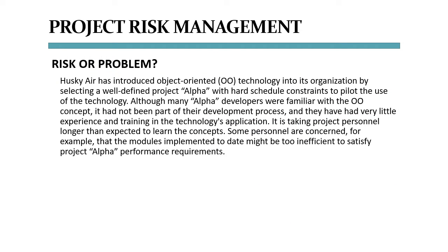There's a difference between a risk and a problem. The major component of a risk is its likelihood or probability. To become a risk, a situation can't have more than a 90 to 95% probability of happening. If a situation has more than a 90 to 95% probability of happening, it is a problem, and we need to be reactive to it instead of being proactive.